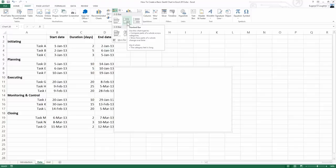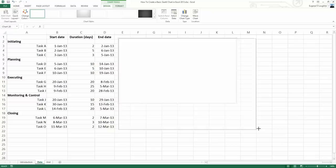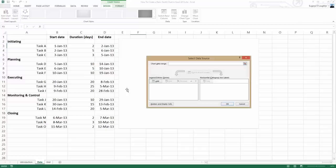This gives us a blank chart that we need to populate with values. At the top in the Design Ribbon, there is a Select Data button. Click on the Select Data button, and this displays the Select Data Source window. This is an important window for drawing Gantt charts in Excel, because this is where we tell Excel what values we want on our chart. Simply, the first thing we need to do is add the start dates, and then add in the duration.